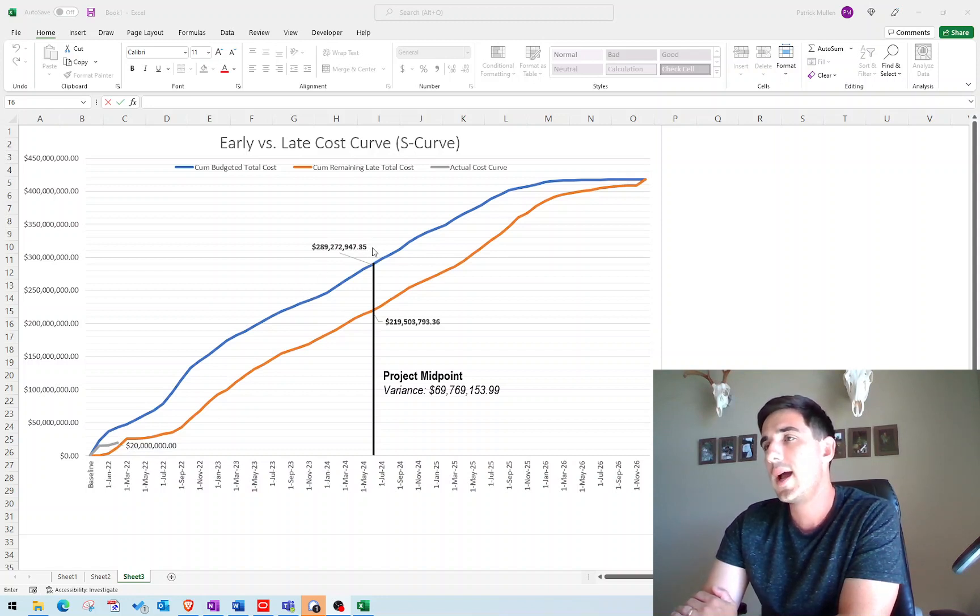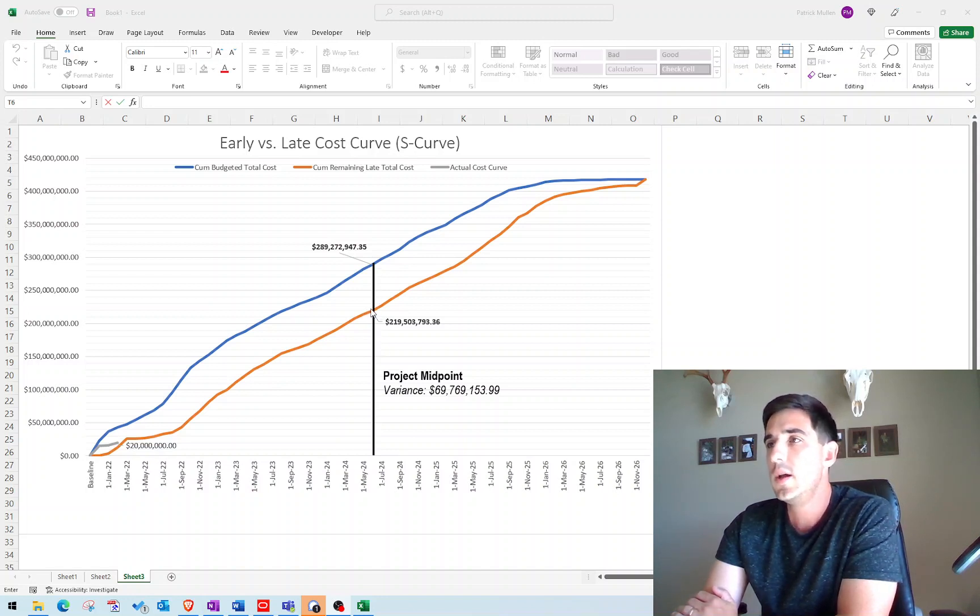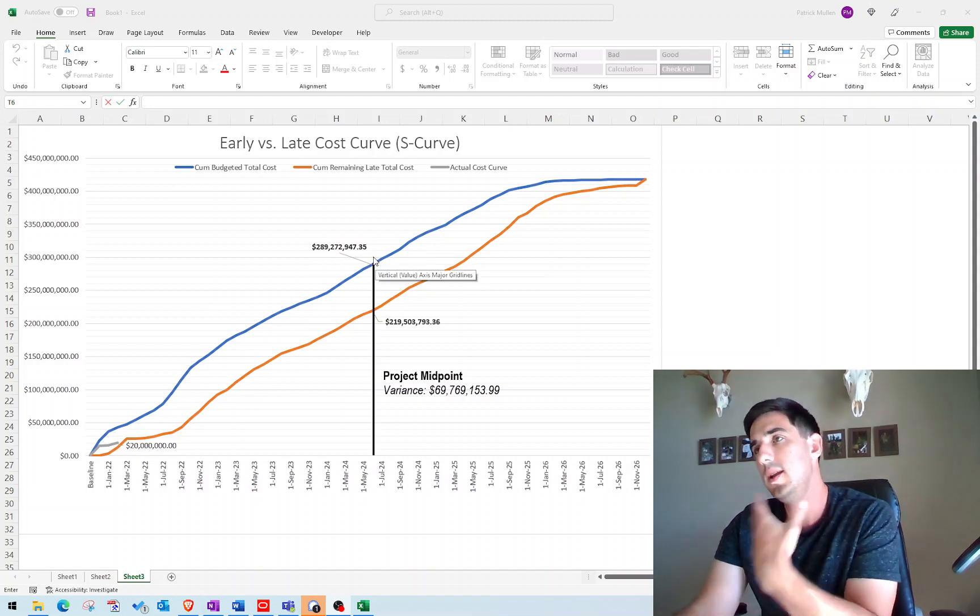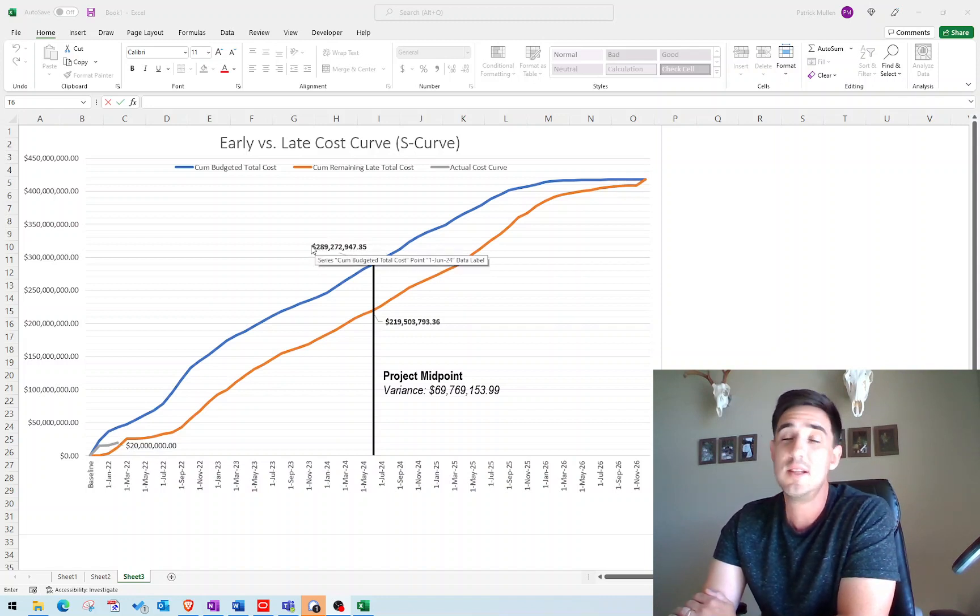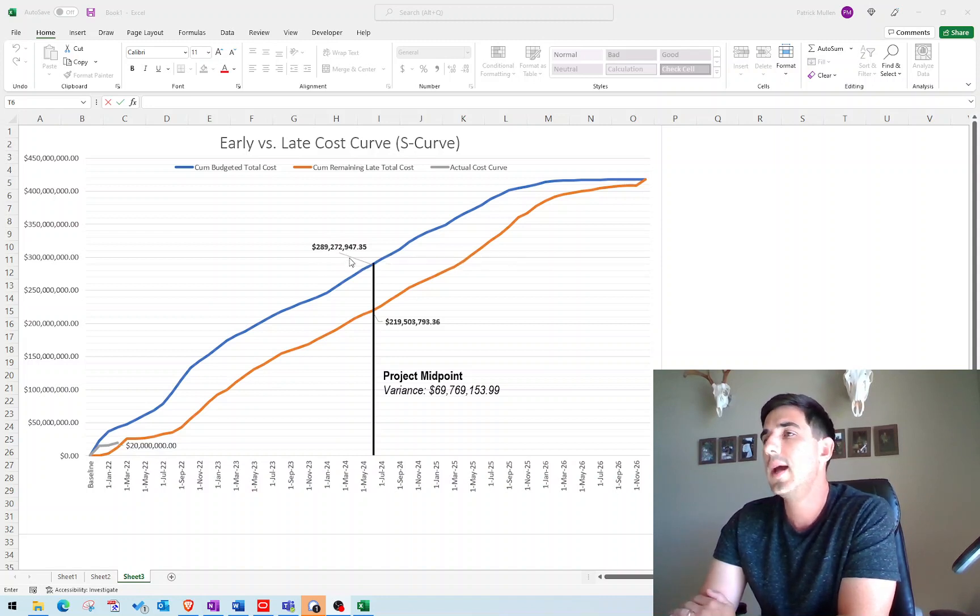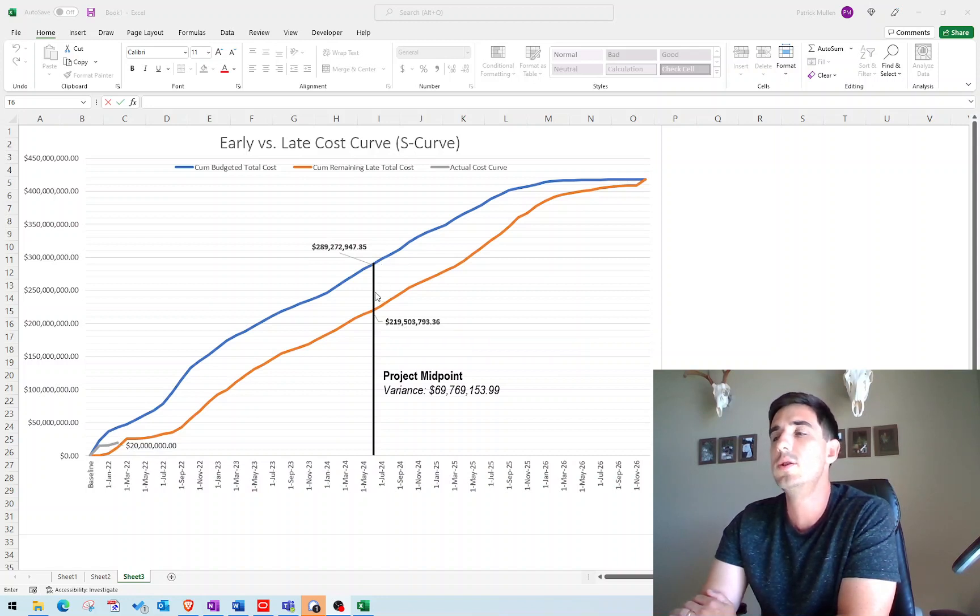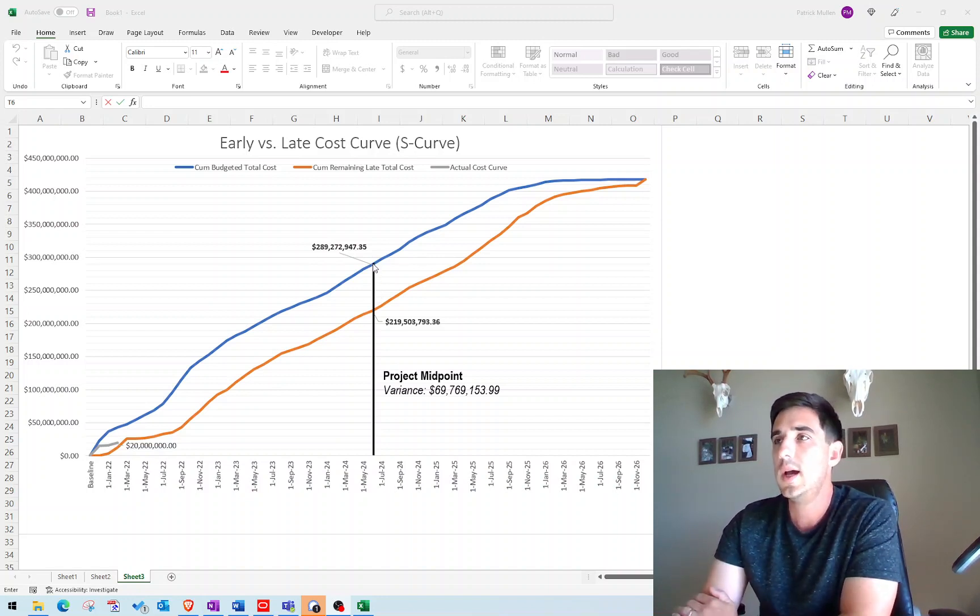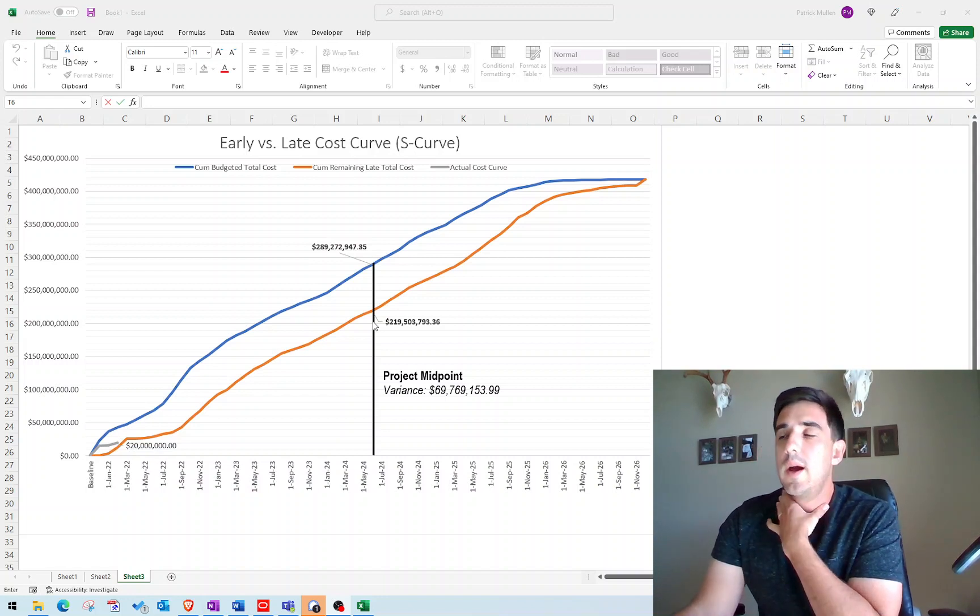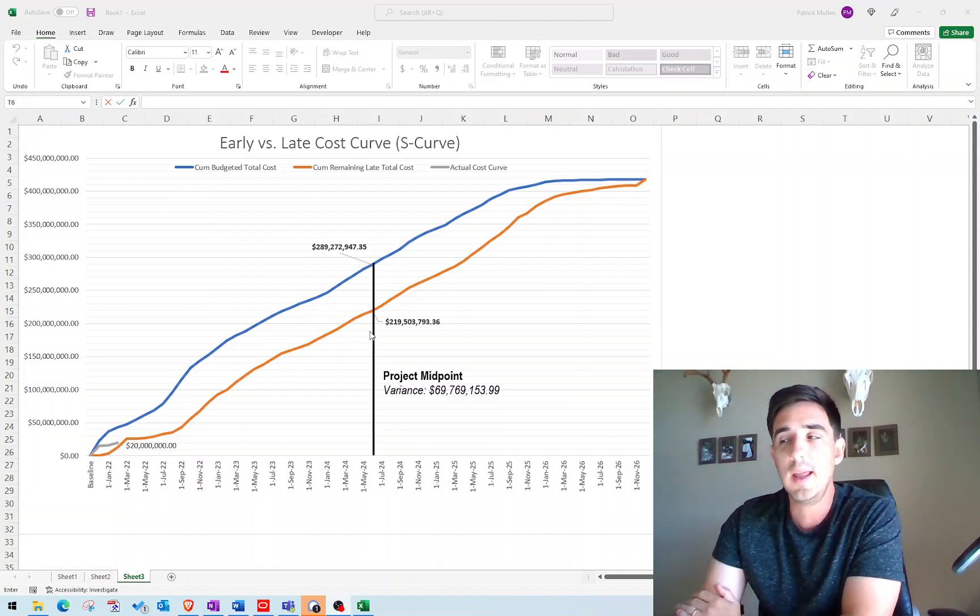If we look, I like to track the midpoint of the project when I'm doing these graphs and just put a variance. So what this tells me is at the midpoint of the project, if the contractor is on time or indicating on time completion, he should be billing somewhere between, on this project, the high point would be $289 million, and the low point would be $219 million. Somewhere in between those two numbers would indicate an on time completion. So if he falls out of that range below $219 million at the midpoint, that would be indicative that that work is not being accomplished as planned and that the schedule is probably late.